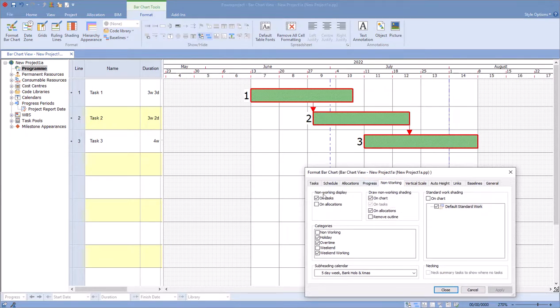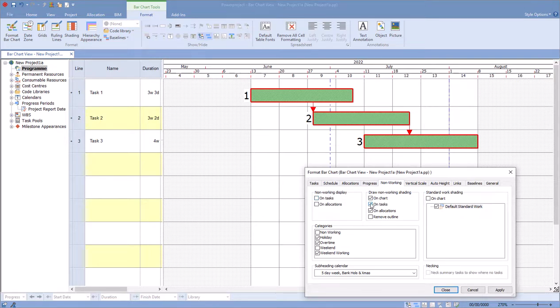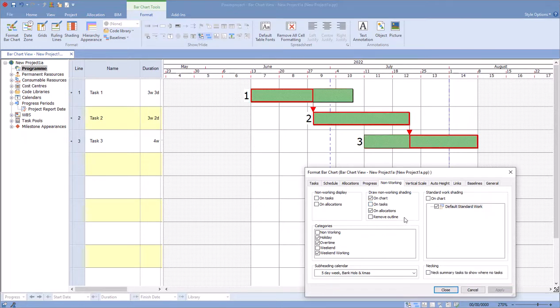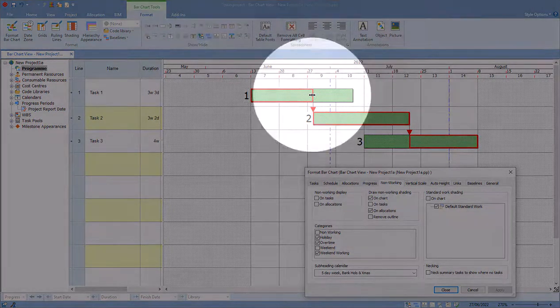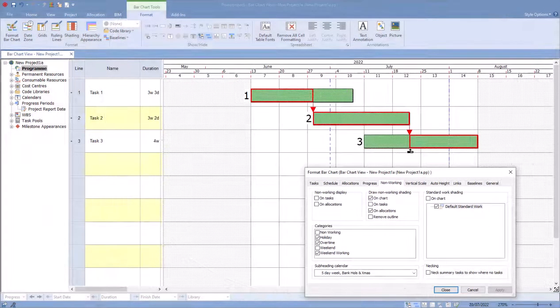And I'm simply going to untick the On Tasks under Non-Working Display and untick the On Tasks on the Draw Non-Working Shading. Simply apply that and now you can see here our critical path finishes at the end and starts here.